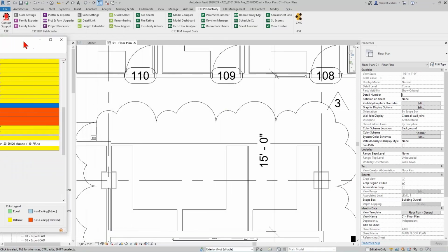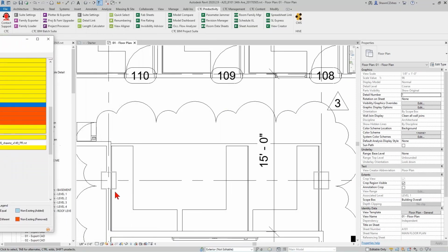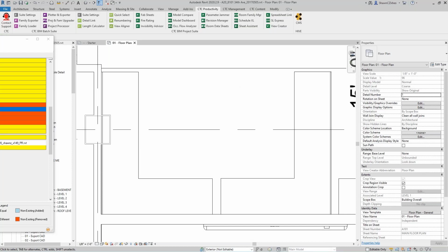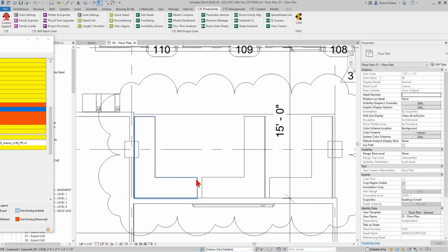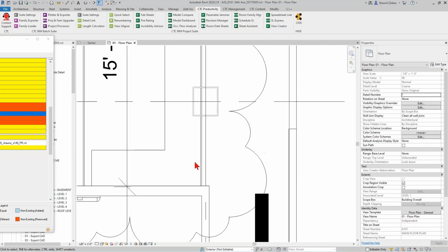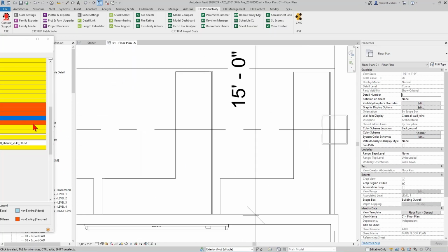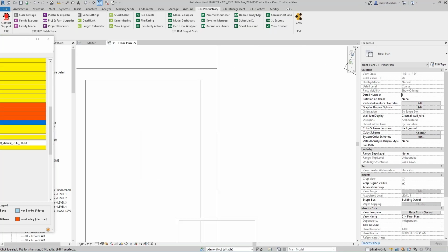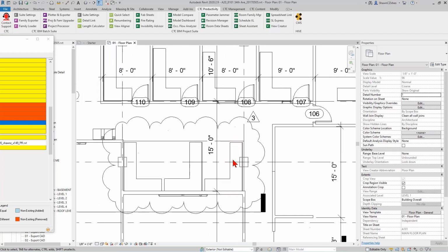In fact, let's pull this off to the side here. We'll just click through these 5 little areas. There actually is a cloud around this area, which is good to know. Somebody actually was documenting that there was a change. But zooming into the model, there used to be something sort of in this middle area here. And if I click the next wall that was in that list, it zooms in. And if I zoom back just a little bit, yeah, something used to be sort of in the middle of that area, right? Zooming in again, something used to be here. So if I'm looking at this and understanding this correctly, this area of my floor plan probably had a series of divided offices of sorts, and now it's more open floor plan.